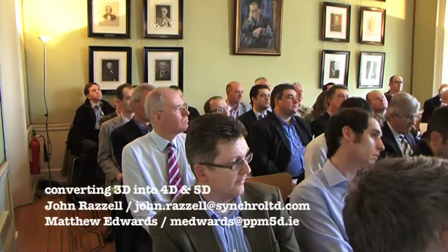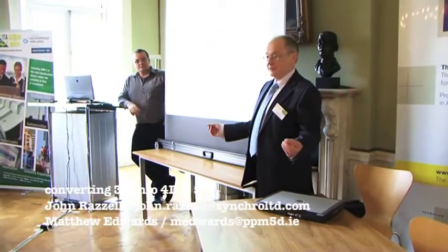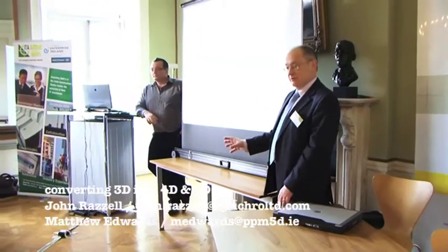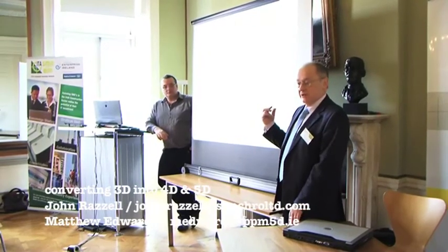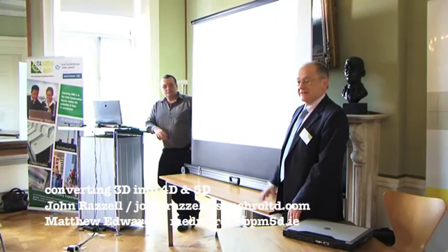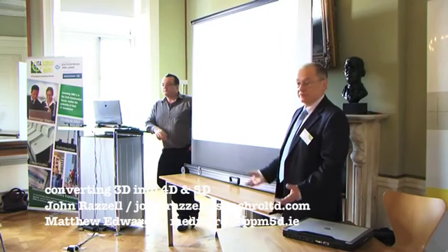We're not aware of any specific return on investment figures. But as the gentleman at the back says, you've only got to look at this and say, this has just saved me one item, moving the site huts. If you suddenly realise you've got to move the site huts, it's going to cost you more than £3,500. So it's saved that on just the one project, and hopefully you'll use the same software on a number of projects.